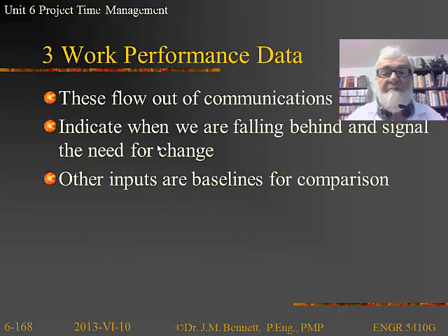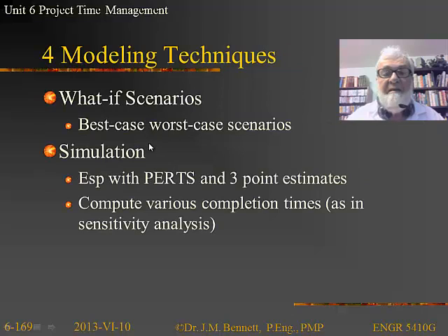So those are our standard inputs here. The only thing that's really different is the work performance data that's going to indicate when we're falling behind in terms of the schedule, although the project manager is probably going to know that already. Now, the modeling techniques, we can do what-if scenarios, best case, worst case scenarios, that sort of thing. We can try and do simulations, particularly with PERT diagrams and three-point estimates. Take the best case estimates all the time, take the worst case estimates all the time, get a measure of the difference between the two, and then that's basically a form of sensitivity analysis to find out how sensitive project schedule is to being delayed or being sped up.